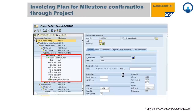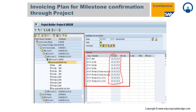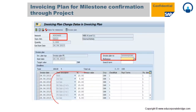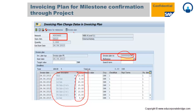There is an example of invoicing planning for milestone confirmation through the Project System module — this is PS and MM integration. A number of milestones are attached to a particular activity with scheduled dates. After maintaining the dates and assigning milestones, you click 'Edit Activity on Invoicing Plan' for that activity, copy the milestones along with the invoice percentage required, and the system automatically generates an invoicing plan number in the background when you save.